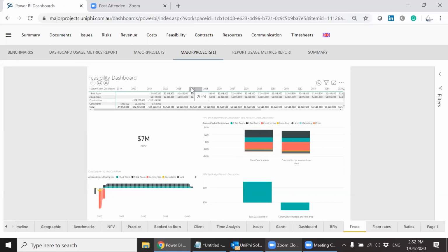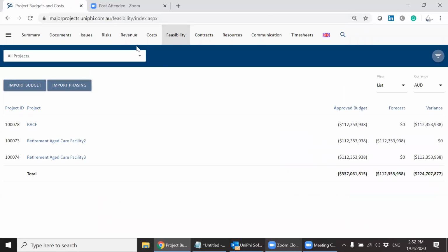And so tomorrow we're going to actually build a calculation from scratch and end up back in this screen using the model rather than showing you how to build the model. So it's just purely on using the model and how you can create these scenarios and drive the model. But that's essentially how you build it. Start with custom fields, then metrics, then chart of accounts, and then derivatives. And, after about 3 months of effort, you've got yourself a model you can use.